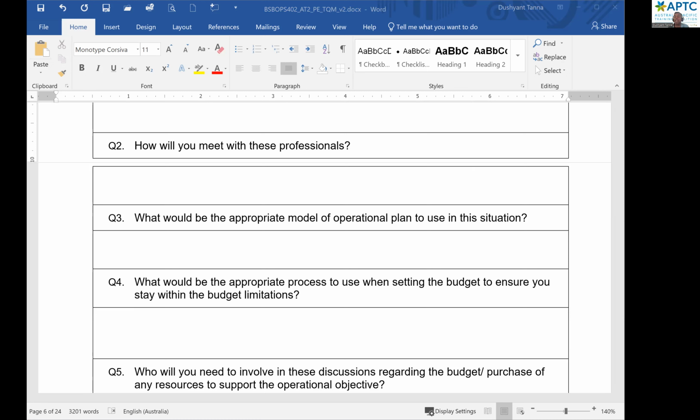So like I said yesterday, remember contingency. If I have 60,000, I will only plan for 50,000 or 45,000. I will leave aside 10 or 15,000 as a contingency. What if the training costs more? What if the recruitment costs more? What if the resources that I'm looking for cost more?